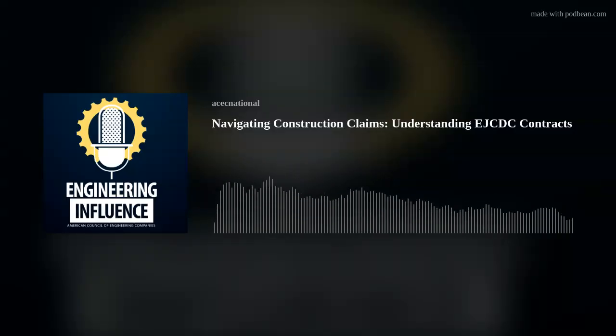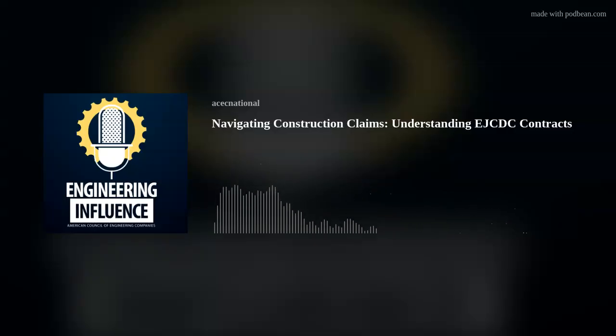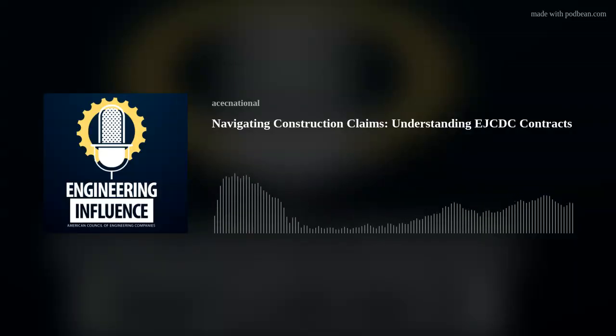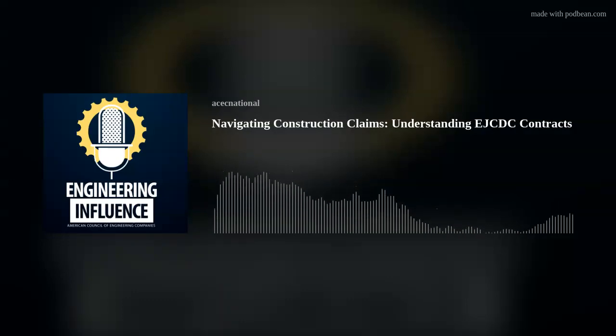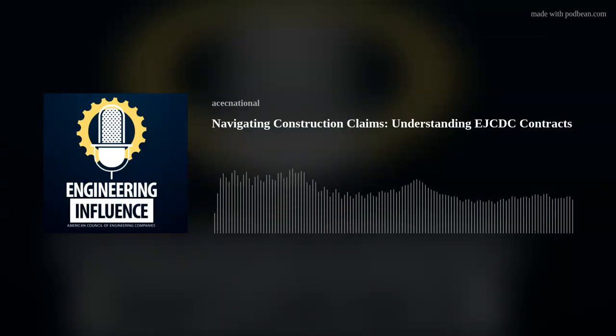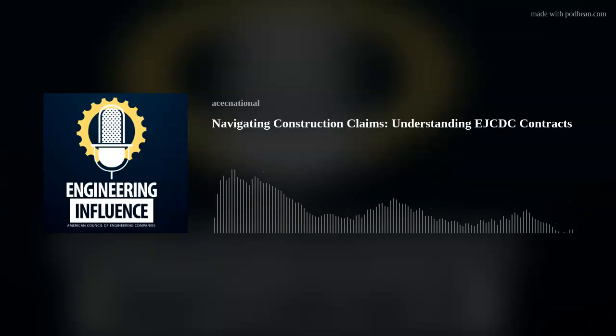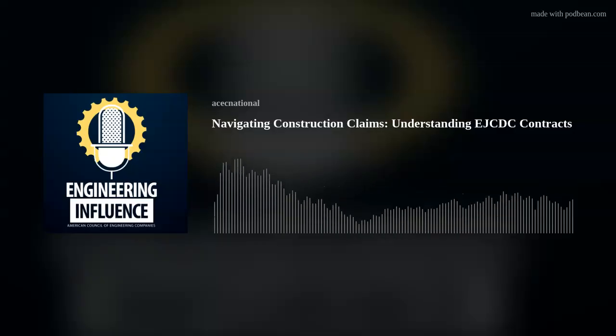And there's a lot of reasons for that. One of them is that geotechnical engineers often have a bunch of disclaimers in their recommendations and the reports that say this is only for the purpose of the person who hired me and paid me, not for anybody else. And in fact, the EJCDC documents regarding the contractor's right to rely on existing information about the site expressly state that no representation is made that any subsurface or other types of investigations performed by the owner or engineer for the project are ever represented as being appropriate for the contractor's means.